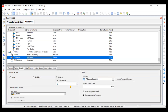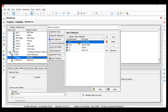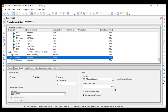To add units of measurement, go to the Admin option in the toolbar, then Admin Categories. Inside Units of Measure, you can see we already have square meter, meter cube, meters, and metric ton predefined. The only one we need to add is lump sum. We'll write 'LS' as the abbreviation and 'lump sum' as the unit name. You can shift it up or down as needed — it is not mandatory. We'll click Close. So we have created all the units of measurement required for our IT building project materials.